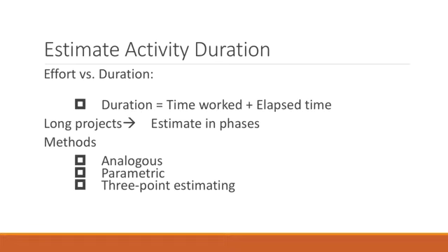If we put more resources to complete a particular task, we know that intrinsically the task itself is going to be completed faster. However, there's another side of the coin, and that is how much money you are devoting to those particular resources. If you devote more money to a particular resource because that's going to reduce the time, then there's a trade-off that you need to analyze.